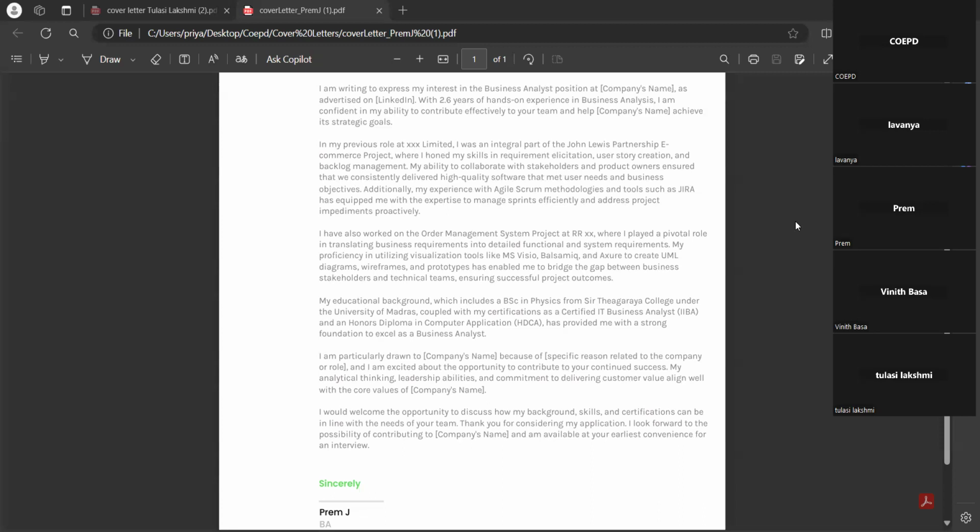Once we move the user stories from the product backlog to the sprint backlog, we divide them into tasks and keep the tasks in WIP, work in progress. Once a task is completed, the developer moves it from WIP to the done column. Along with the done state, we get the shippable product increment, and the client will conduct the UAT and accept it. Yeah, I got it. Good.